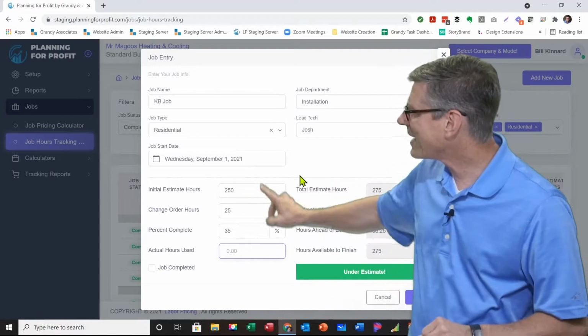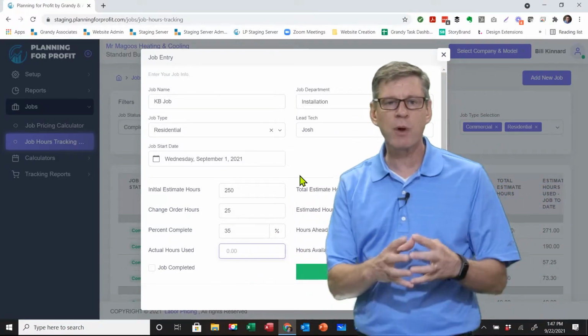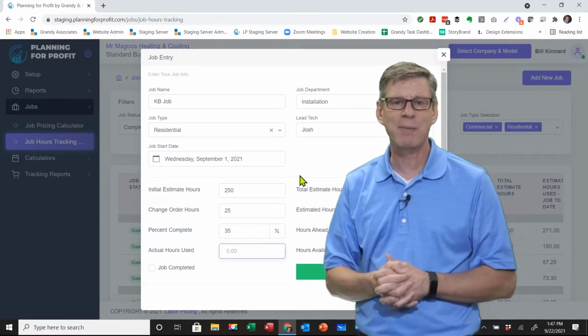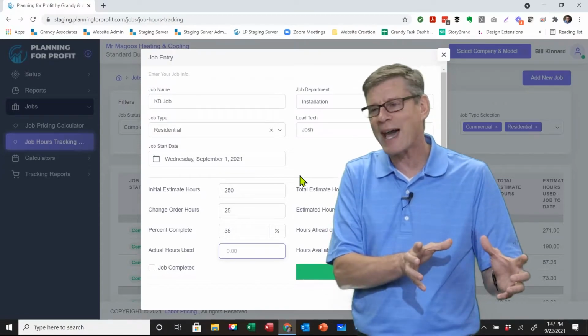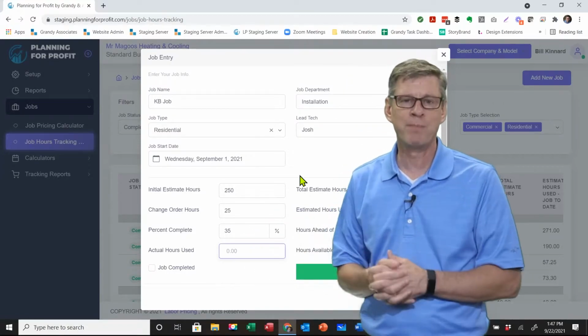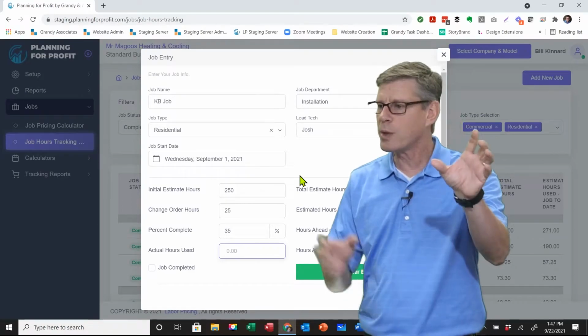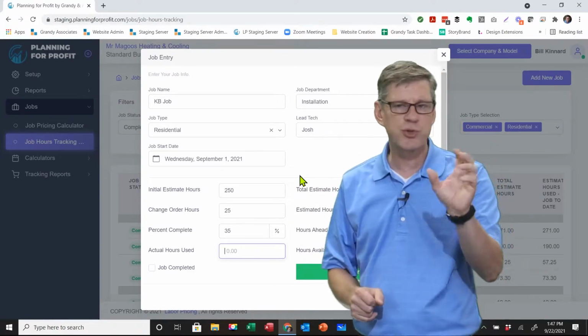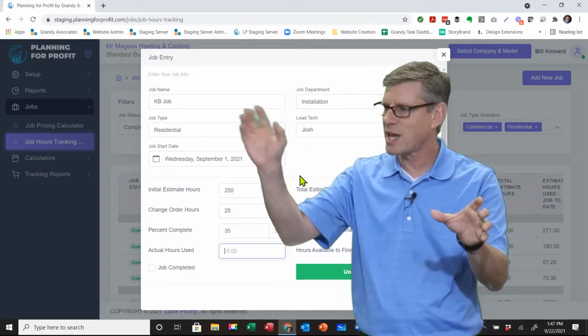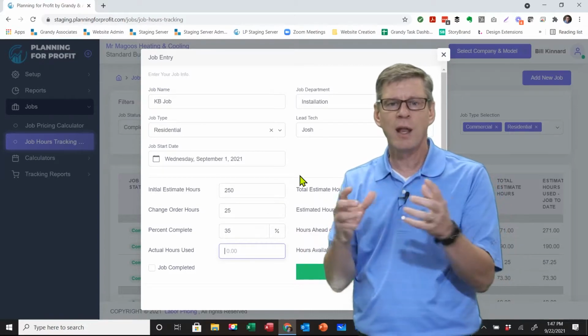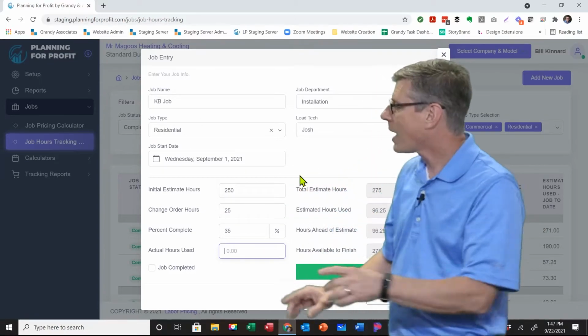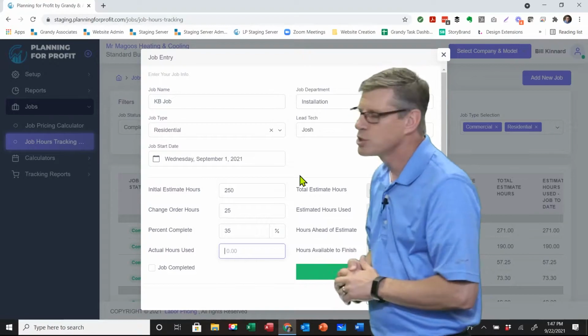Next, at the end of each week, look at your payroll summary, look at the job tickets that came in, and how many hours did the guys apply to this job? Today it might have been Joe and John who were out there working, and tomorrow it was John and Jeff, and the next day it's Kent and Bill. So again, for the whole team, how many hours have they applied to this particular job?